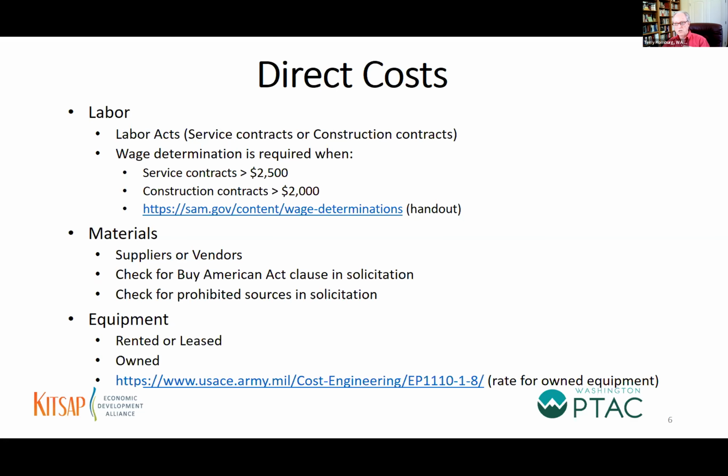There's been a court case decades ago, and the contractor lost that argument when they said, well, the contracting officer from that agency issued the solicitation, and there was no wage determination in there. And then they awarded the contract to me, and there's still no wage determination in there. So it's not my responsibility how much I'm going to pay my employees. And the judge said, no, you, the contractor, are responsible for knowing the correct wages to pay your employees. So you're on notice there.